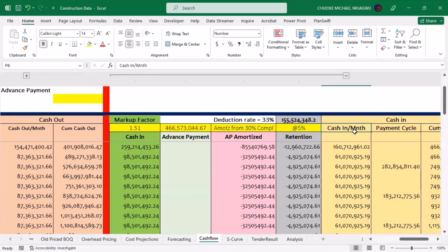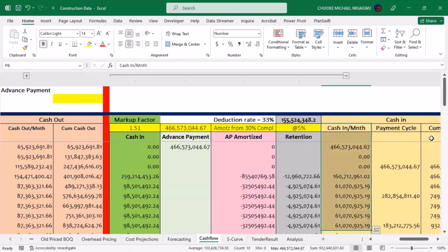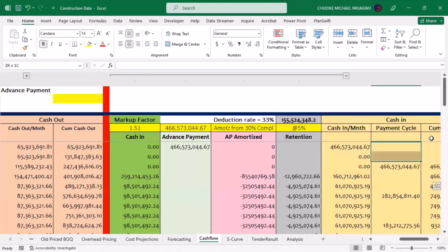Ordinarily, this would have done the thing for us, and we'd just do a cumulative based on that. But we now have to cushion this time lag, which we have to take care of here. The document said 56 days, and 56 days will also include weekends and the rest of them. Then we are given an additional 4 days to make it 2 months. All right. So if we finished the month 1